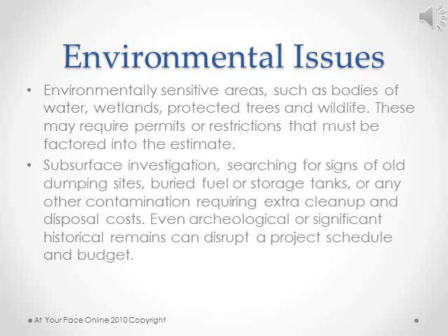Subsurface investigation, searching for signs of old dumping sites, buried fuel or storage tanks, or any other contamination requiring extra cleanup and disposal costs. Even archaeological or significant historical remains can disrupt a project schedule and budget.